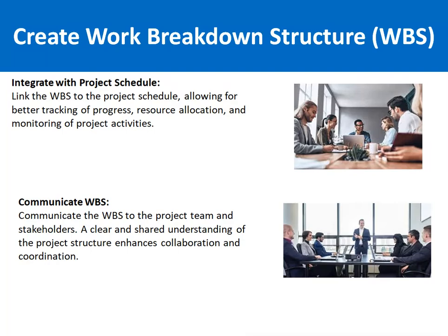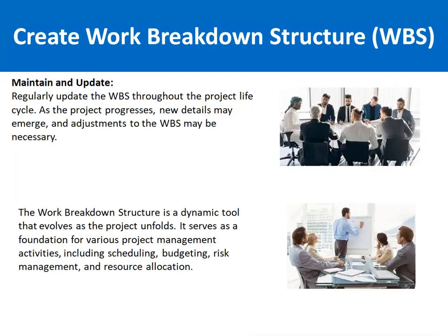Then you can integrate the WBS with the project schedule. It's a best approach that you can use Microsoft Project to link the WBS with the project schedule, so it will allow for better tracking of progress, resource allocation, and monitoring of project activities. Then communicate the WBS to the project team and stakeholders, as a clear and shared understanding of the project structure enhances collaboration and coordination.